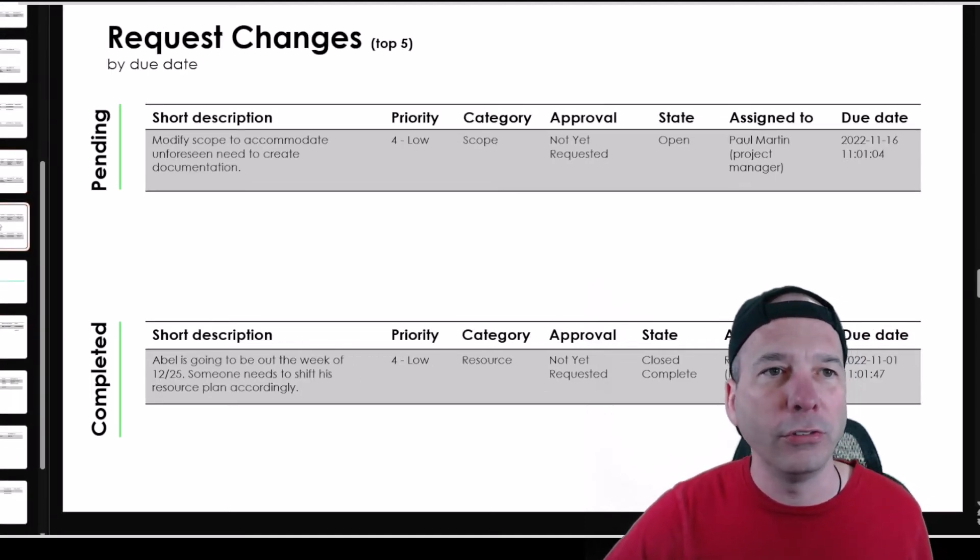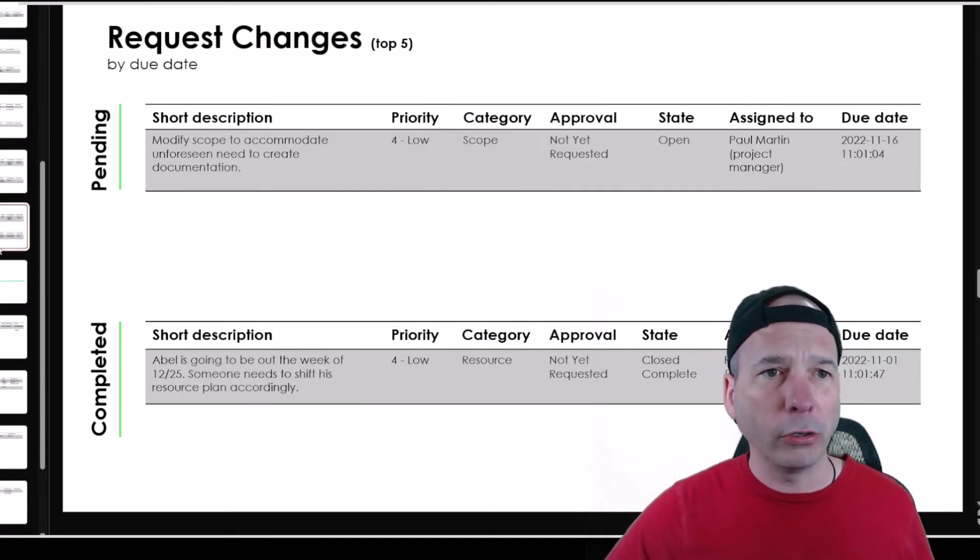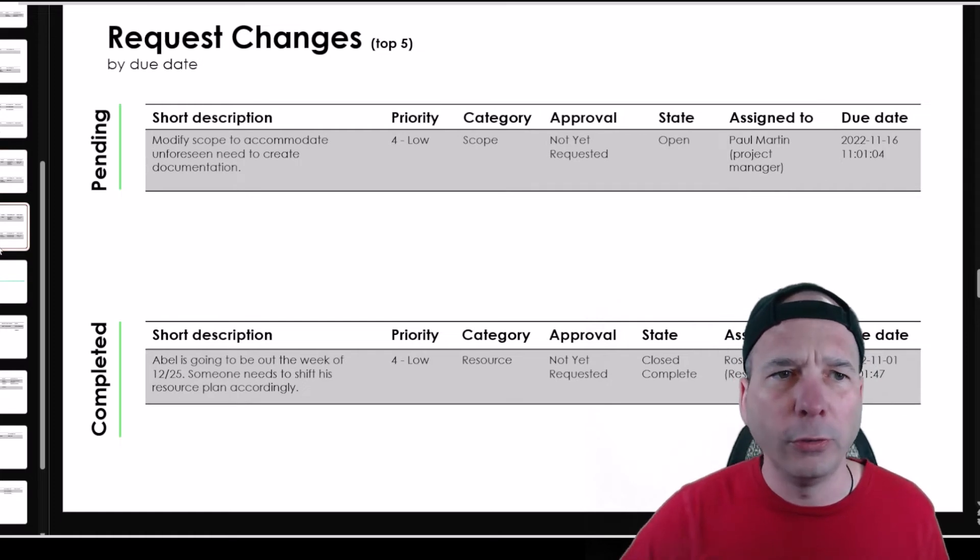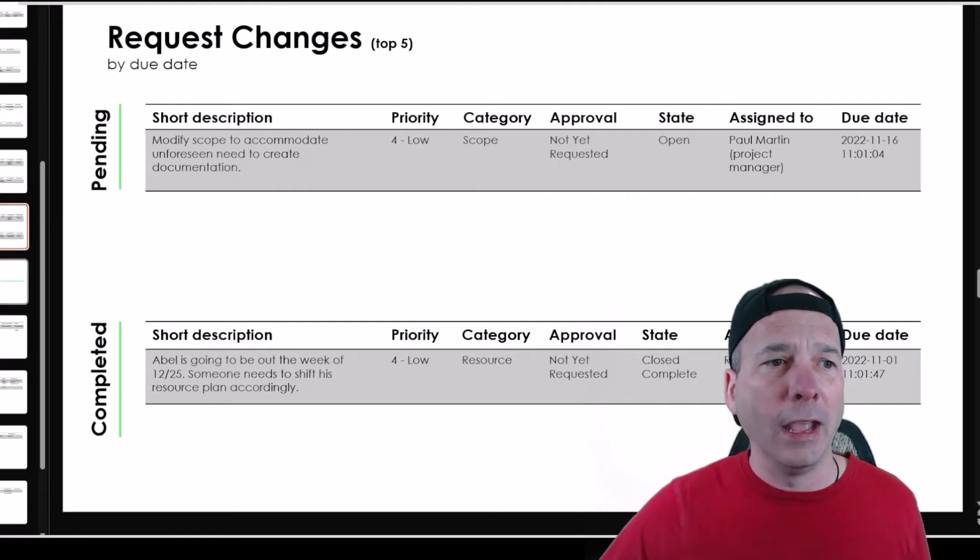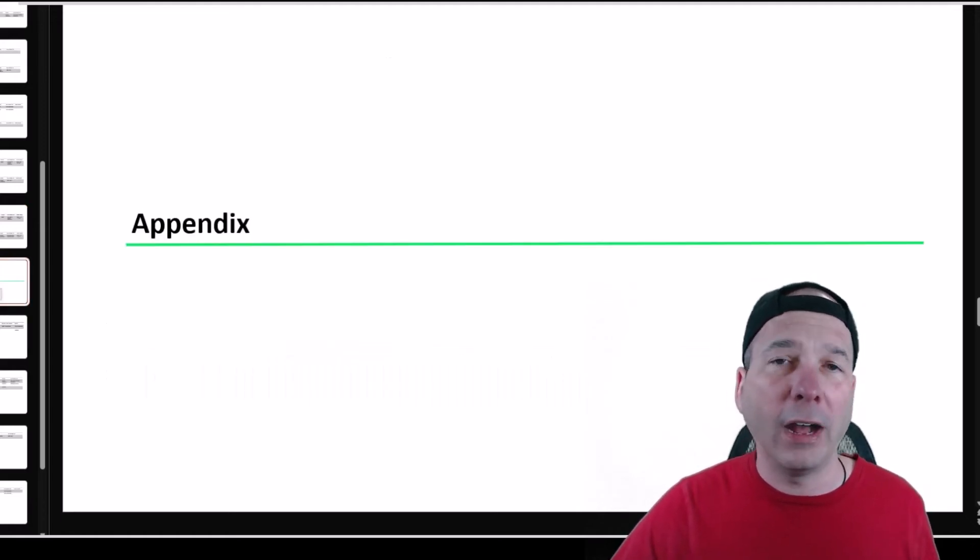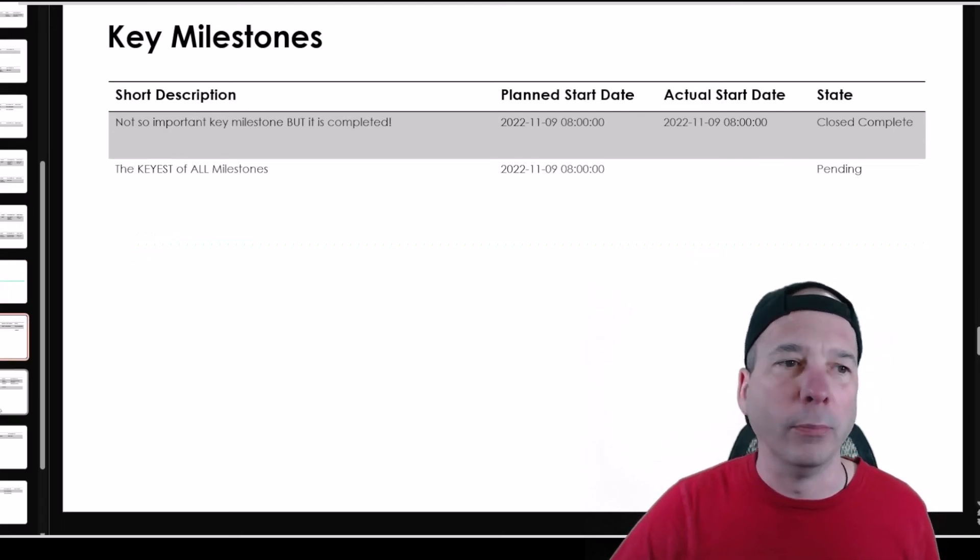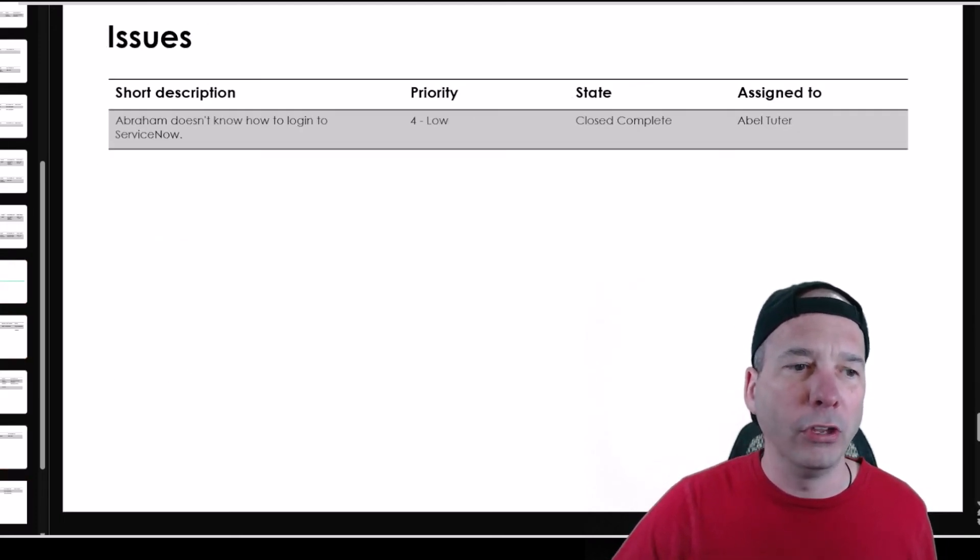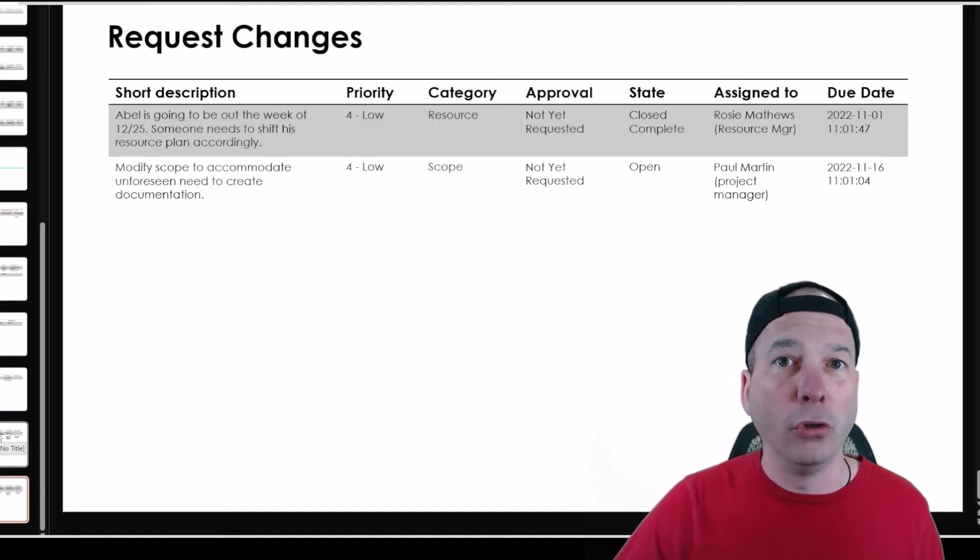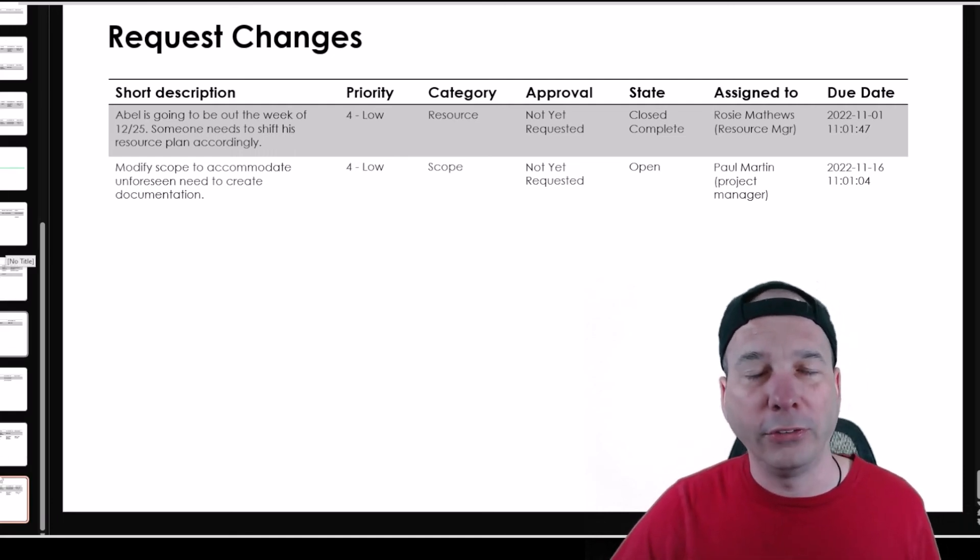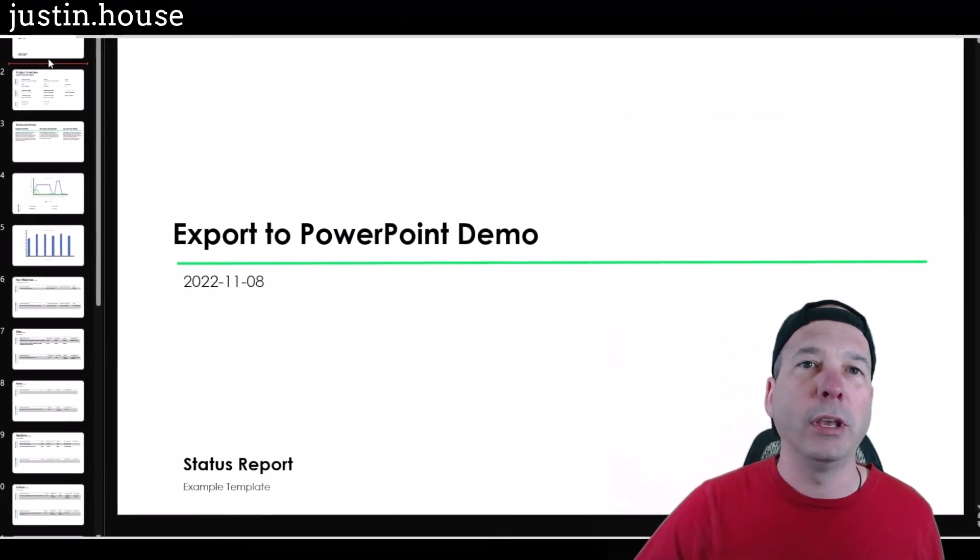The request changes. So I've gone through all of those. On the request changes I didn't cover that, so this one's pending to modify the scope, and then there's a completed one for Abel's, whose resource plan needs to change. And then the appendix. So the appendix is not showing the top five of the things you just saw. It's going to list all the key milestones there, all of the risks, all of the issues, all of the decisions, all of the actions, all of the changes. If you know ServiceNow, we've referred to that as RIDAC. So that's your RIDAC components in your PowerPoint that we exported from ServiceNow.